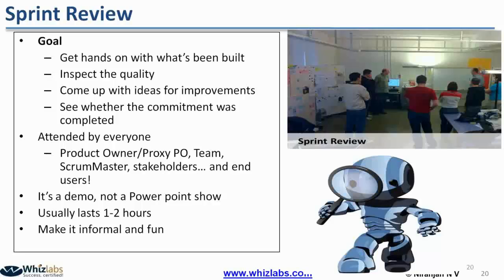I will tell you certain things which in general can be part of the definition of done. One of the things is that the code has to be unit tested, and also it has to be code reviewed. Without code review being done and the review comments closed, we should not even think of giving it for sprint review. So DOD item number 1: code has to be reviewed and comments have to be closed before the sprint review.